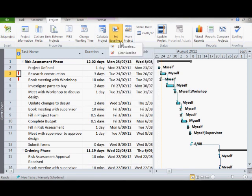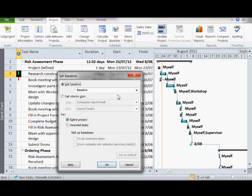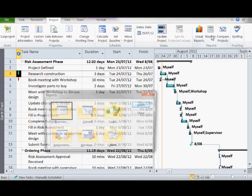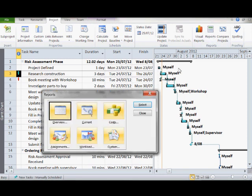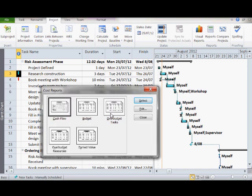The first thing you should do is set a baseline. This baseline is used for comparing future changes against. The first report we will look at is the project budget. This baseline budget shows all the costs associated with a project from our original project plan.